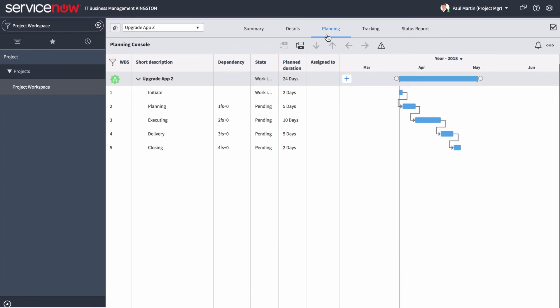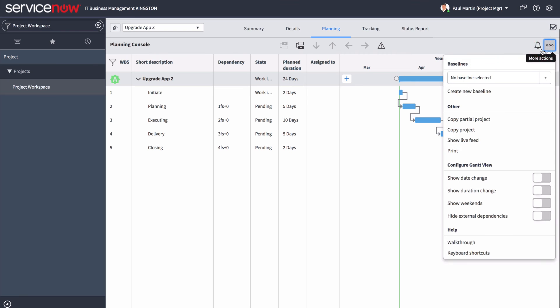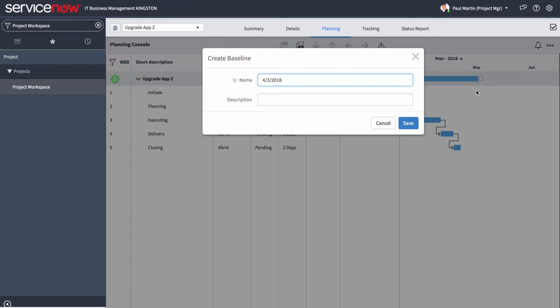To create a beginning baseline, click the More Actions icon, and then select Create New Baseline.